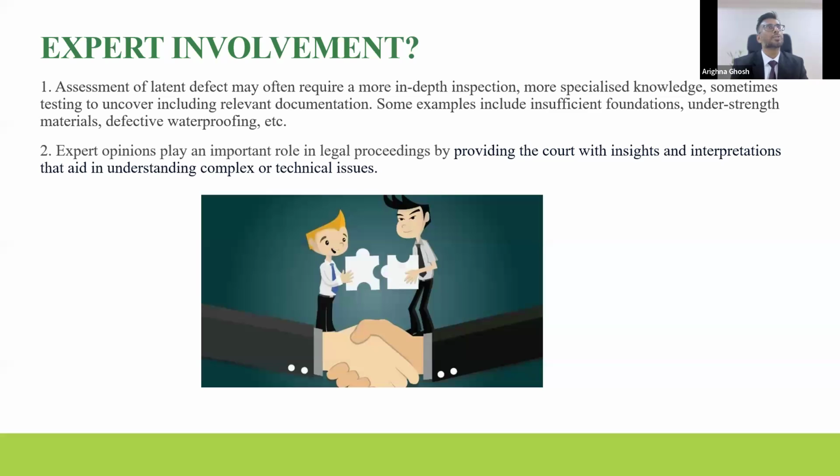Something else, let's say, there can be cases where the root cause analysis in itself doesn't give you a foolproof case of what has happened. So in those cases, it becomes very essential that the party goes for a technical expert or a third party opinion who is actually aware of that particular matter, what has happened. And certainly when the previous root cause analysis is inconclusive.